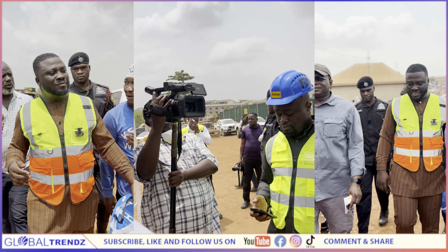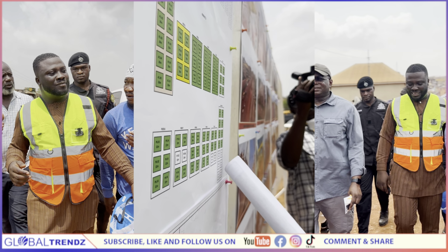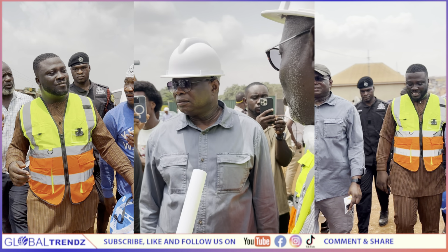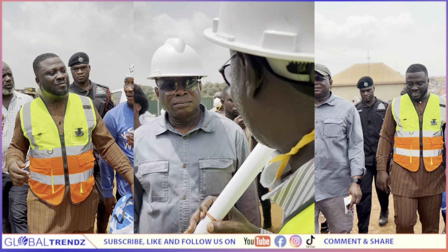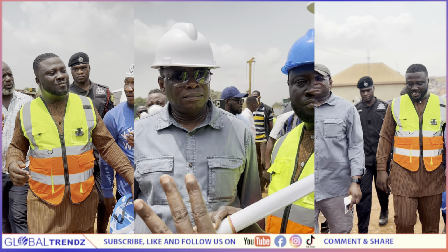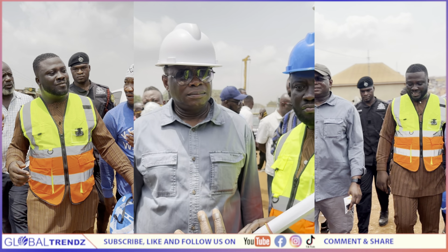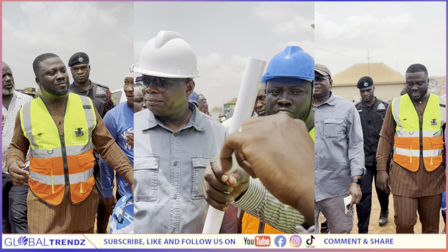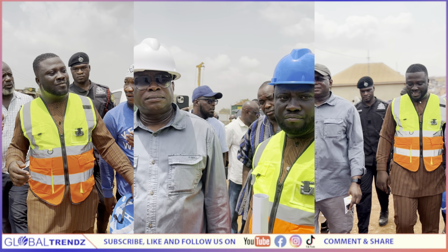And then these ones here show the interruption by the Ghana Water lines, which have still not been relocated. Actually, for the Ghana Water lines, all the new lines that have to be laid in order to make the place free for work, we have laid all the pipes. It is the connection back onto the main water that we are having challenges with Ghana Water.